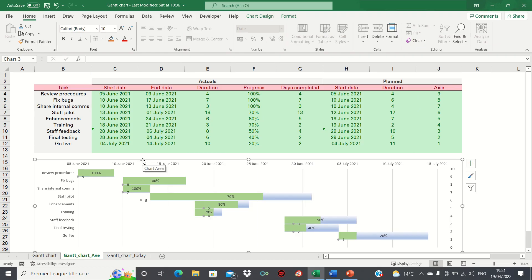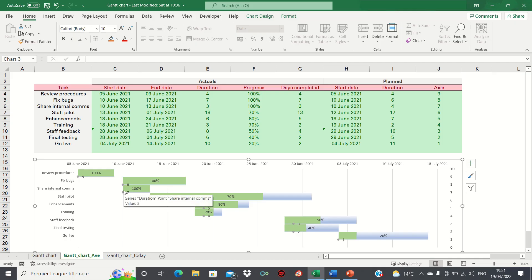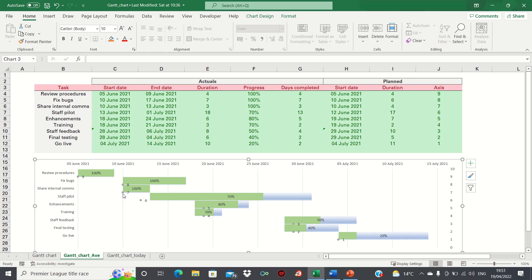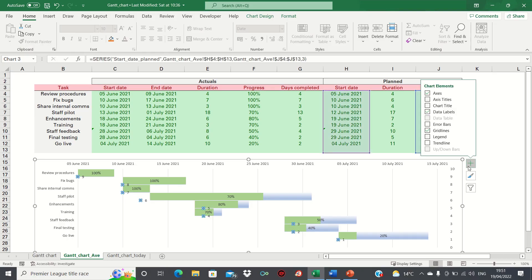Now Excel has returned these dots which represent the start dates, however we want to see the entire duration. To overcome this select the dots and then add error bars.